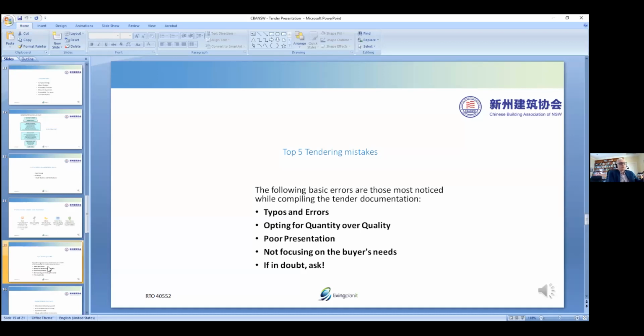Is his most important consideration to make sure that we get the job done before the time period elapses? If we can present our project to him sooner, perfect. So we give him a construction schedule that finishes 1 month earlier than what he's asking for. That might be worth a lot of money to him. So it's better that we do that. And even if our price is slightly higher than somebody else's, they may opt for our tender.